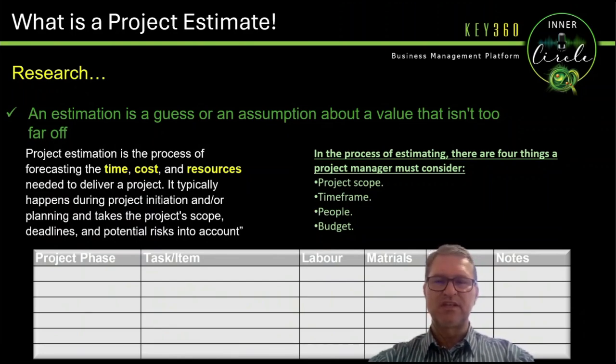So it's important to remember that in the beginning, when you start a project, your estimate will probably be one line, and you'll say, I think it's going to cost us 10 million rands or dollars or euros or whatever. And then as you start going through pre-feasibility, feasibility, and detailed design, that estimate will definitely change from 10 million to something else, because you have more information available now.